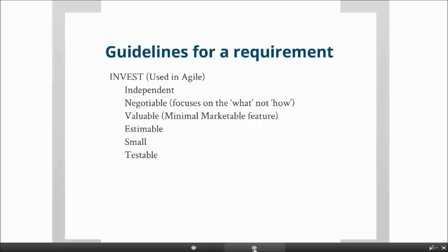What we don't want to do is develop a piece of functionality only to have it sit on the shelf waiting for something else to be developed. That would be a dependency, and we want to stay away from that. A lot of that has to do with priorities, and we'll get into that in the next chapter as well, meaning the order that you prioritize them.